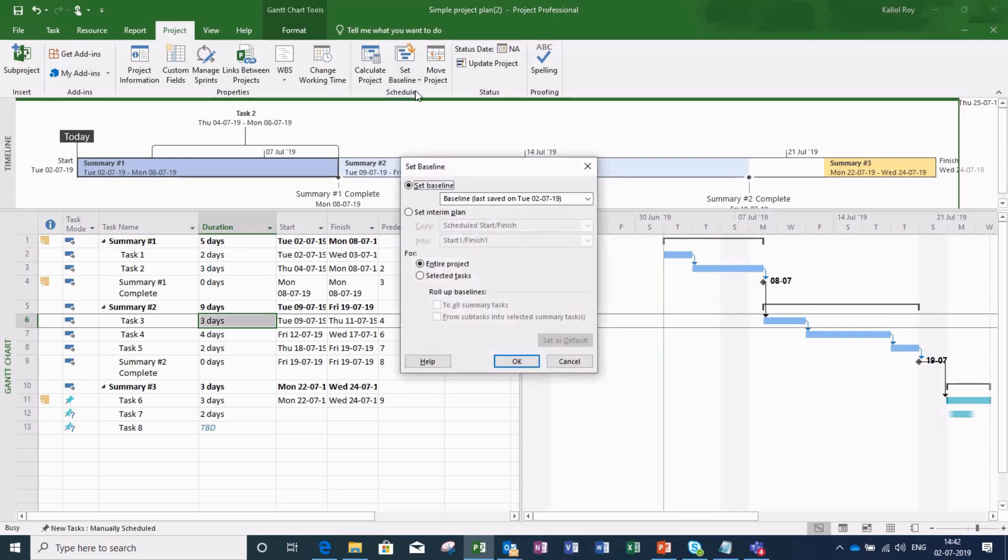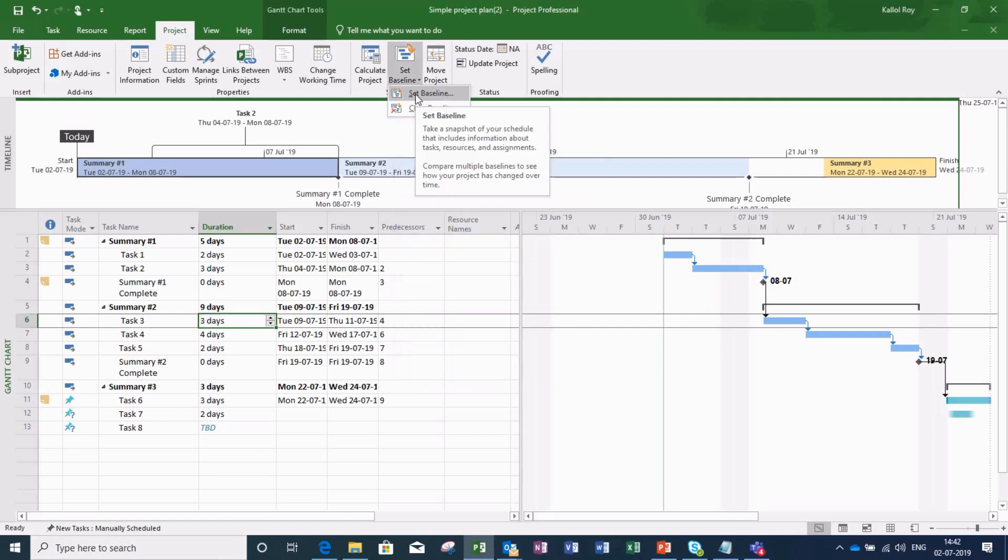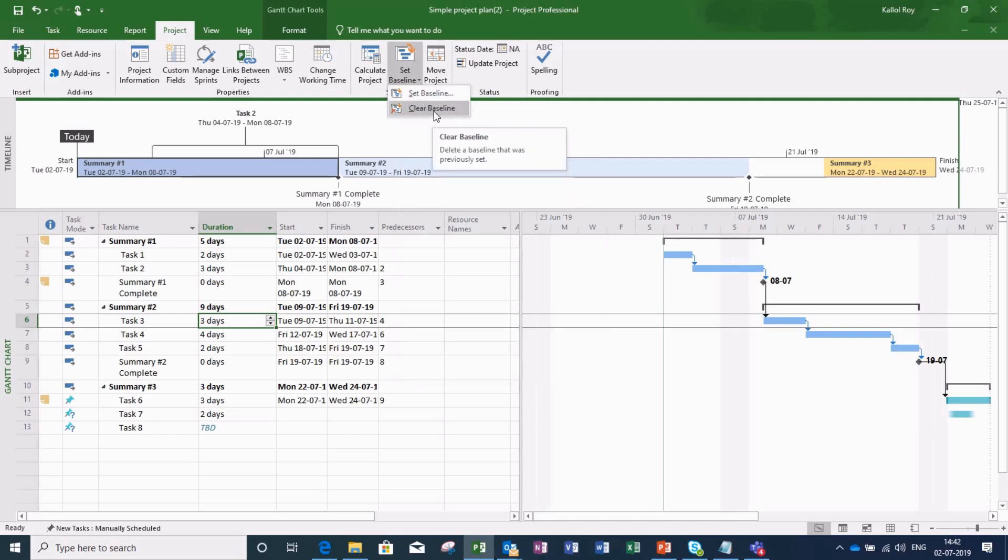Although I can change my baseline of the project as per my changed plan, in such situation my plan will not be traceable. For doing that, I have to again go to the Set Baseline tab and click on Clear Baseline, and then again set the baseline according to the changed plan.